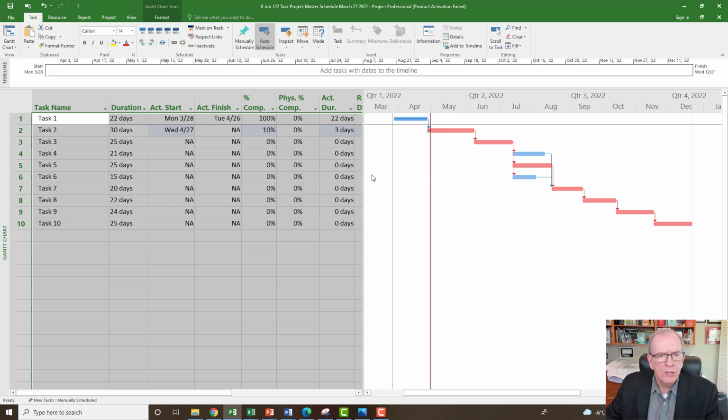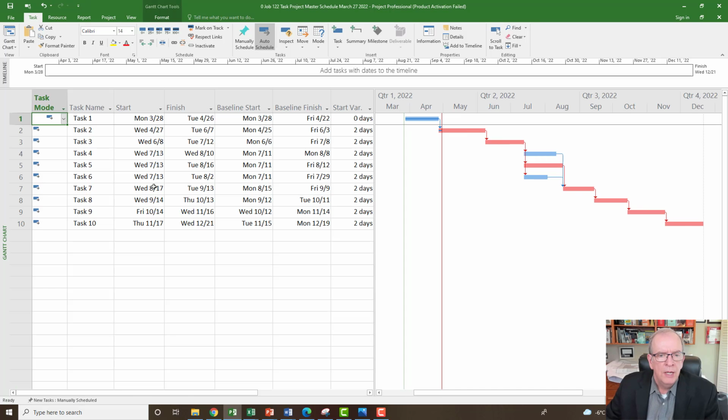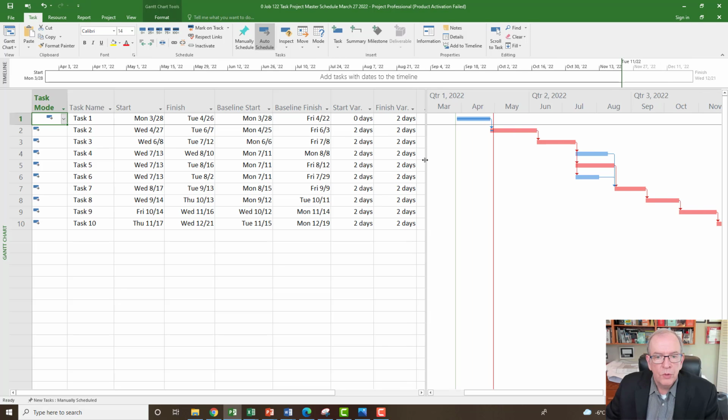Right. So now I'd like to see, well, how much are we delayed? And again, I go into more detail in some of the other videos on this, but I right click and I'm going to go to my variance screen, and I'm going to see how much delayed am I. And I can see I'm 2 days delayed. So that's telling me I'm 2 days delayed. I'd also like to see it in the tracking Gantt. So I'm going to slide to the left, right click, go to the tracking Gantt screen.